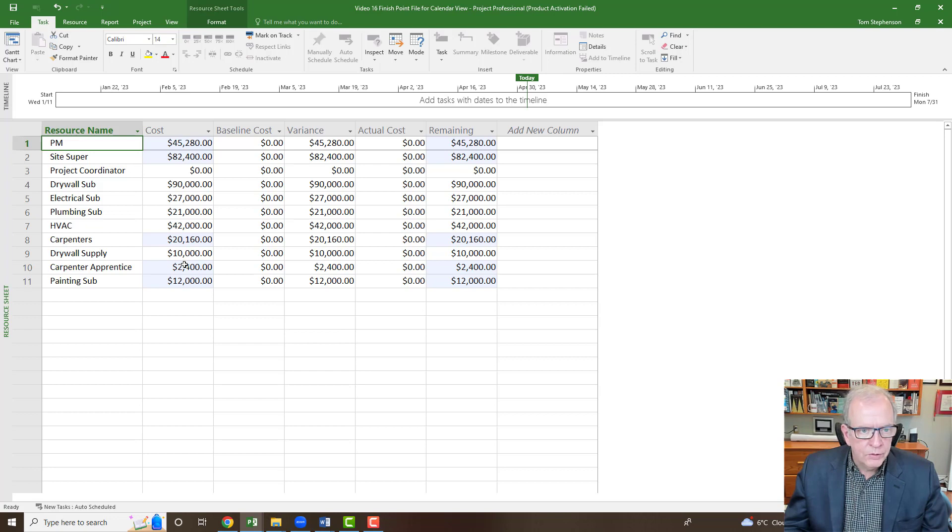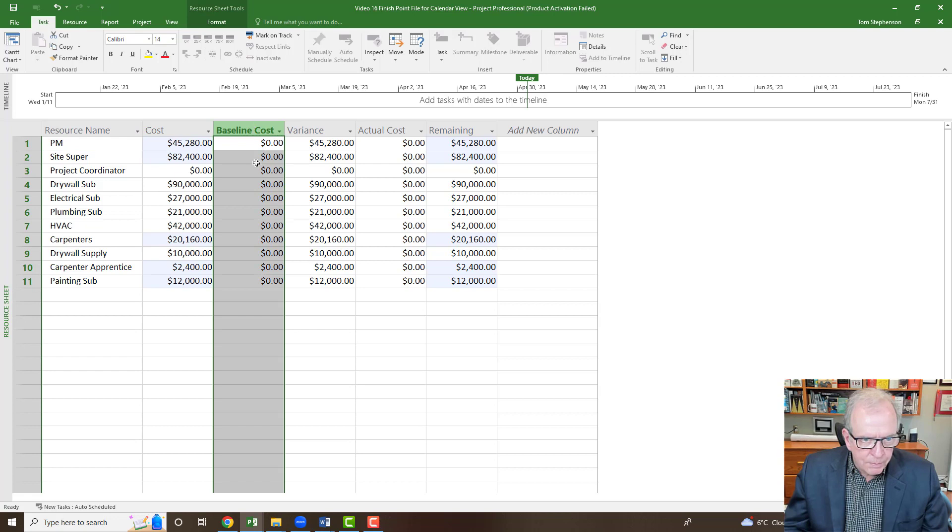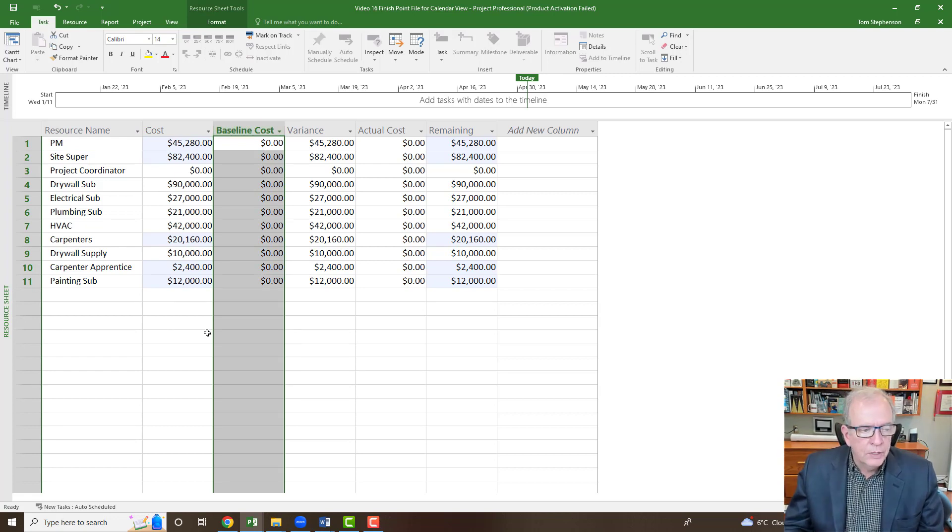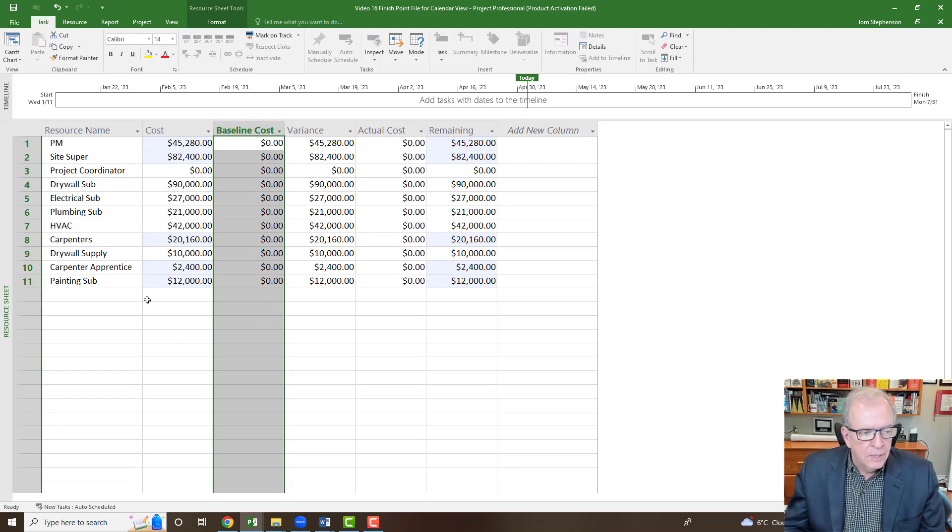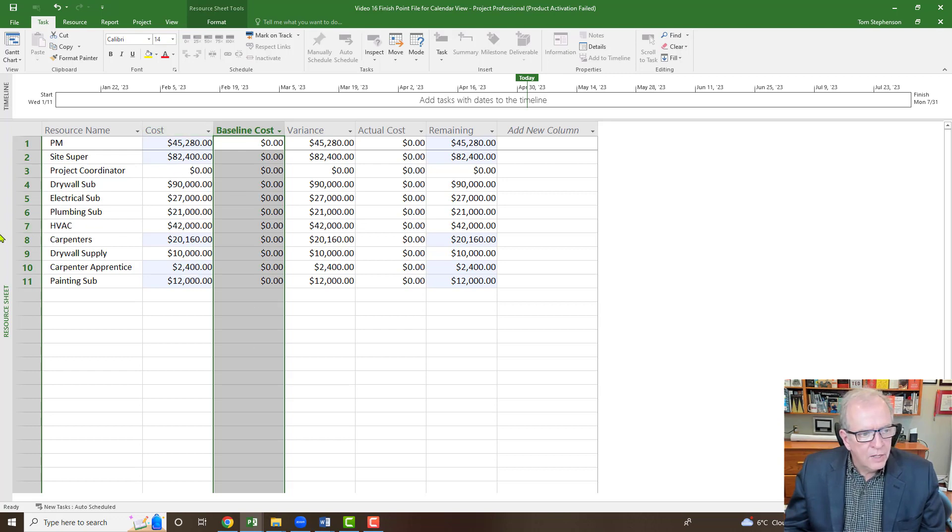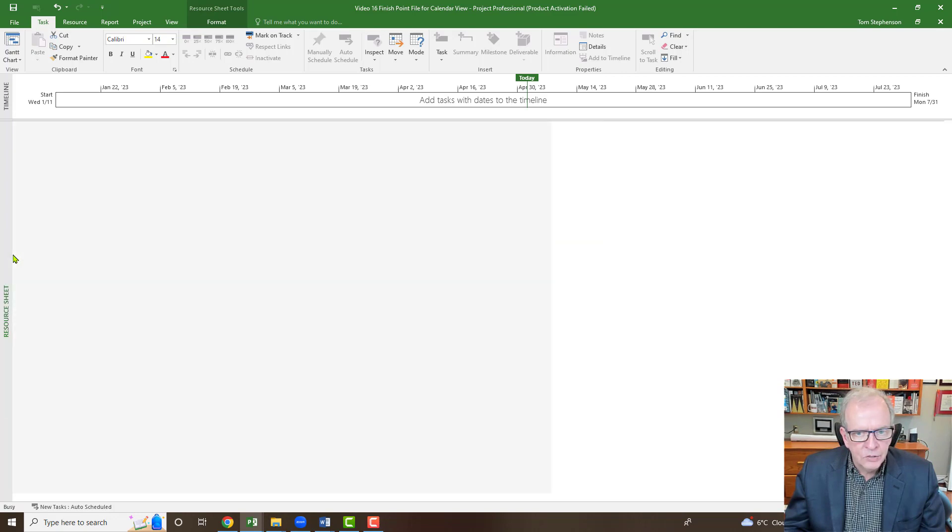We haven't set a baseline on this example that I'm using because it doesn't show a baseline cost. We have done that in ones in the past, so this particular one doesn't have a baseline on it yet. You can always tell that when that's zeroed out and variances have the same costs over here.